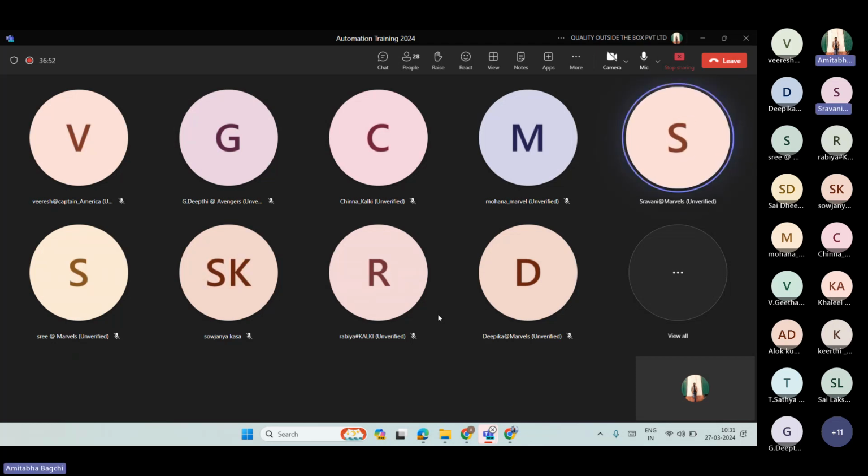Entry criteria can involve multiple things, as you were saying, like test cases have been documented and reviewed. Test environments are ready. Unit tests have a good result, more than 80% success rate. And the product requirements have been frozen, like there will be no new things coming anymore. When all these checkboxes are checked, everything has been fulfilled, then the QA team will start their testing, right?